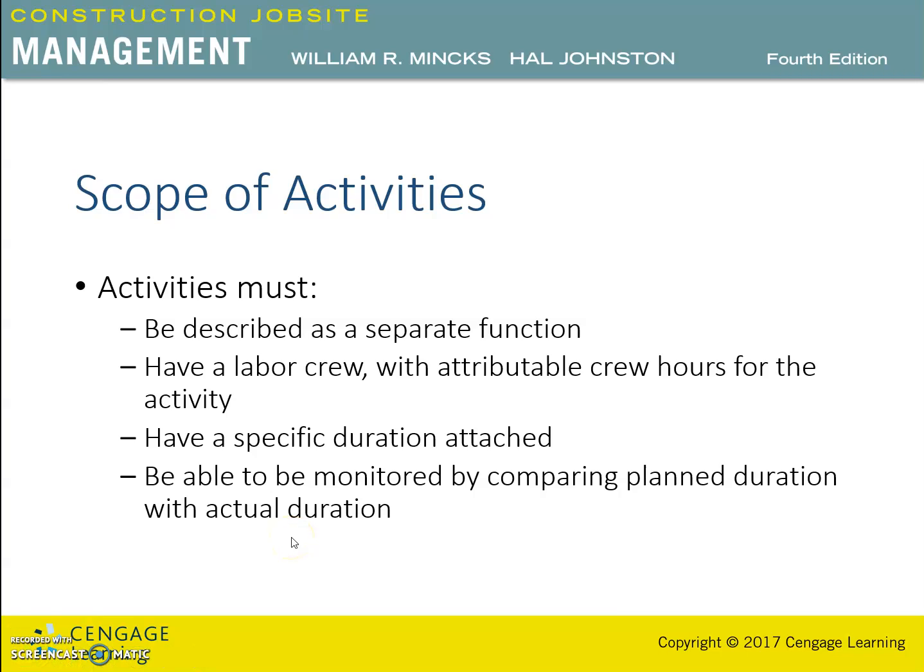So a construction activity has an identifiable block of time that must be included in the construction sequence. It can contain several different steps, trades, and estimate line items. Or there could be a time restraint before further work can be done. So two typical construction activities and their components could be the following.